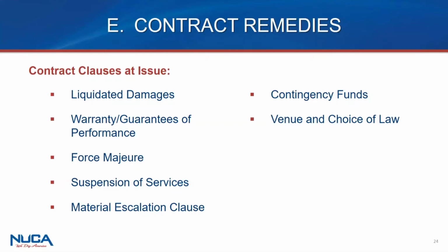And then the last one that is very important, but rarely thought of in the context of material cost escalation is your venue and choice of law. Why? Because not all states treat these clauses the same. Not all states treat these legal theories the same. And you can literally pick, especially if you're working in multiple states, you don't have to pick the state you work in as the law of the state that's going to control your case.